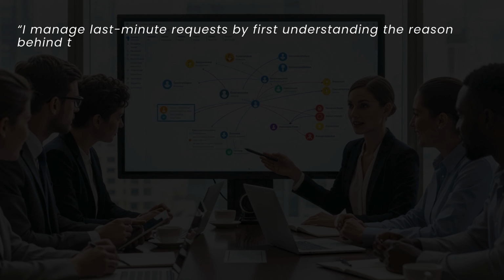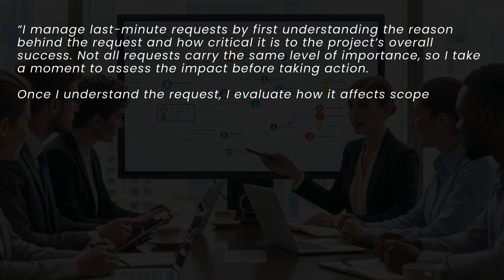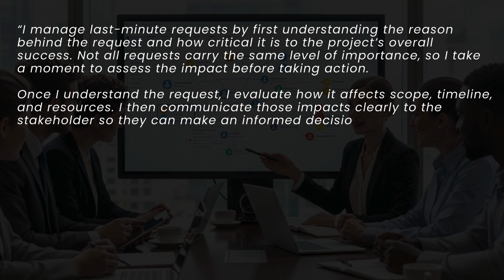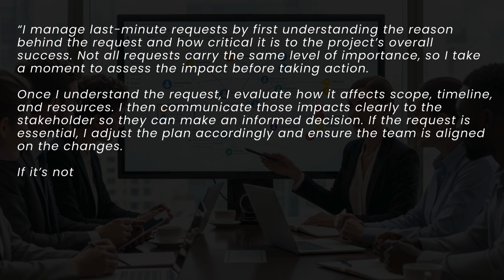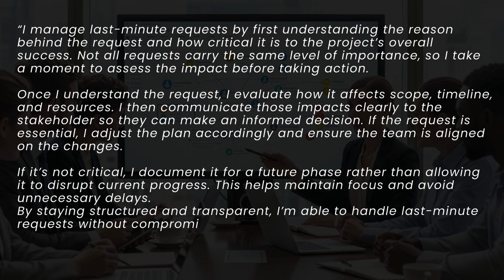I manage last-minute requests by first understanding the reason behind the request and how critical it is to the project's overall success. Not all requests carry the same level of importance, so I take a moment to assess the impact before taking action. Once I understand the request, I evaluate how it affects scope, timeline, and resources. I then communicate those impacts clearly to the stakeholder so they can make an informed decision. If the request is essential, I adjust the plan accordingly and ensure the team is aligned on the changes.